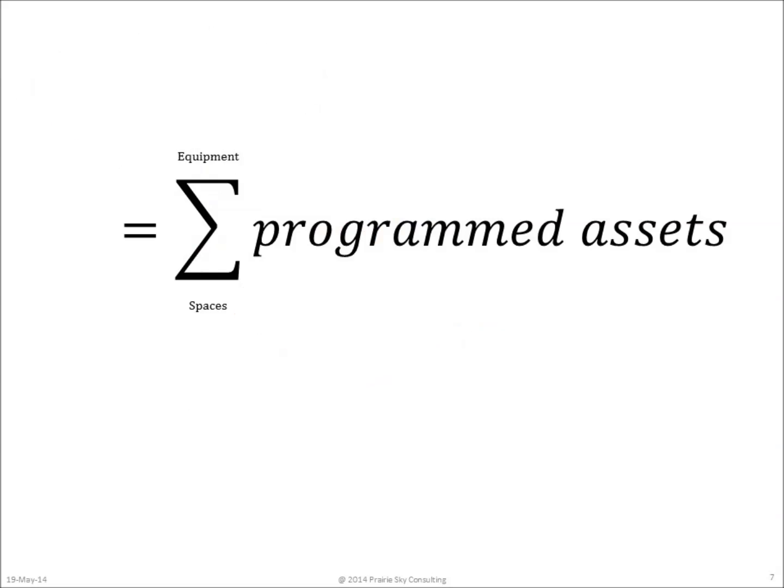So at the architectural programming stage, the COBie file simply contains the spaces and the equipment that are required to meet that architectural program. COBie really can be thought of at the programming stage as just the compilation of all the room data sheets.